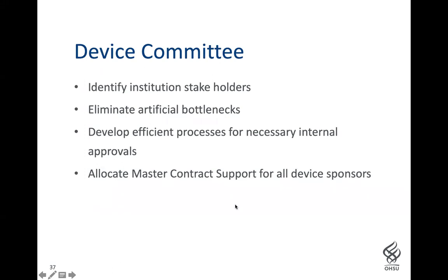We also developed a device committee. This helped us identify our institution's stakeholders and really get them committed to this process. It also allowed us to create cross coverage to eliminate those artificial bottlenecks that come from only having one person at the university able to approve something. Through the committee, we developed some efficient processes that helped us get through these internal approvals quickly. And then we also were able to allocate master contract support for our device sponsors. We found that this was going to be key in getting through the 60-day timeline.